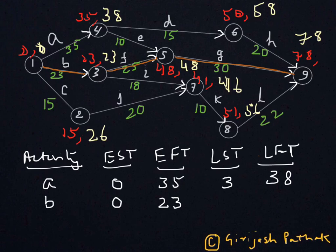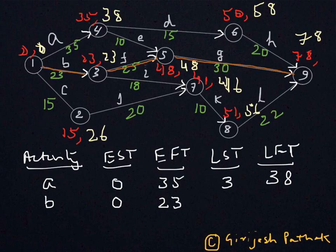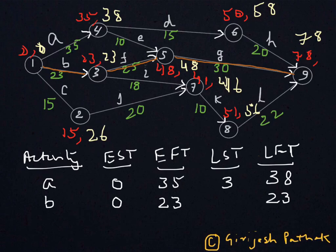For activity B's Latest Finish Time, since it ends on node 3 where the latest time is 23, activity B must be finished latest by 23 days. To get the Latest Start Time, we subtract the activity time: 23 minus 23 equals 0. So the Latest Start Time for B is also 0, meaning the Earliest Start Time and Latest Start Time are both the same.